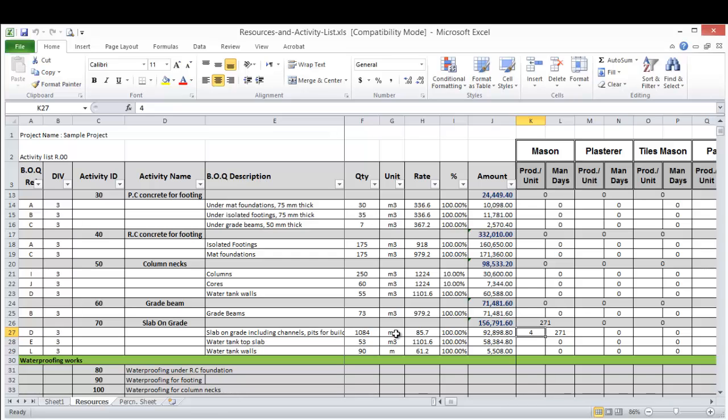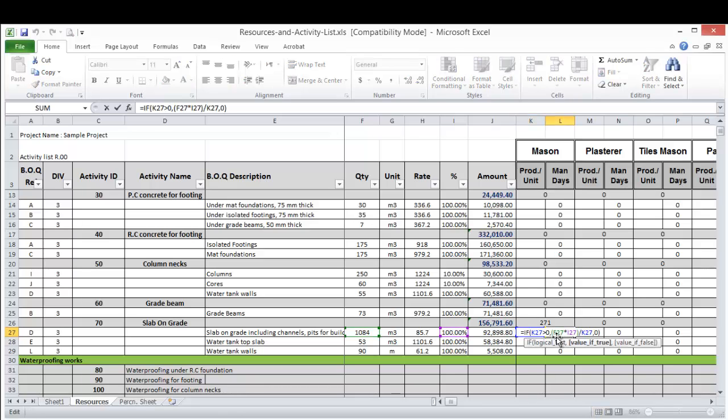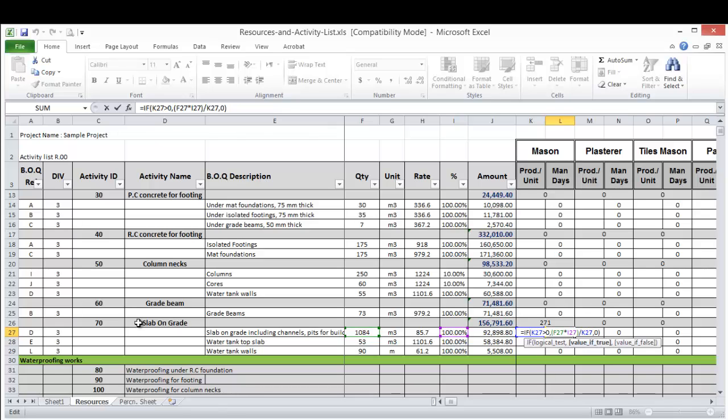And the mandate required to execute this quantity equals simply this quantity multiplied by the percentage of the item if it is not 100% in the activity and divided by the productivity.